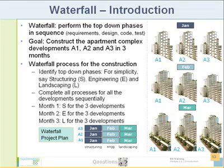So how would waterfall go about it? The logic in waterfall is to complete all processes for all developments sequentially, bringing up all developments simultaneously. Let's say I need to do this in three months. Month one, structuring happens for all three developments. Month two, engineering happens for all three developments. Month three, landscaping happens for all three developments. End of three months, I have achieved my goal: build all three complexes.